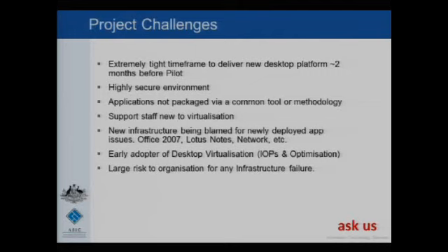I think I mentioned most of those things before. The I/O workloads, the IOPS on VDI, this was a surprise to a lot of people a couple of years ago that were starting out, and to some extent still is. Read-write ratios on your SAN. Originally, the documents I was reading, and the SAN vendor we were dealing with, said cater for 20% write, 80% read. It's the other way around. That was a surprise. We hadn't scoped the SAN to cater for that, which was upsetting because we were an early adopter.